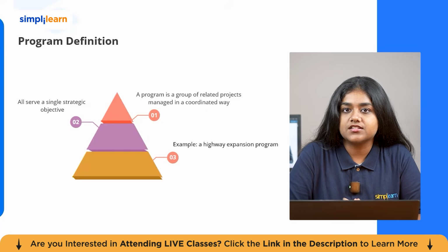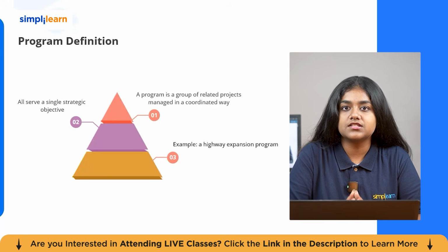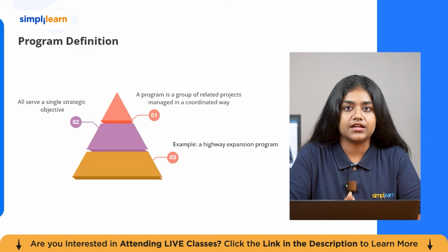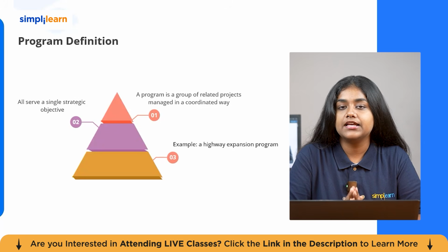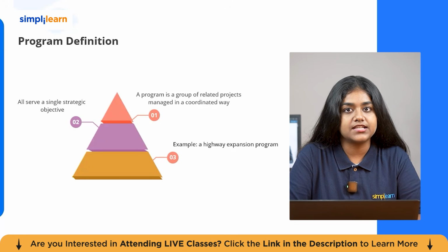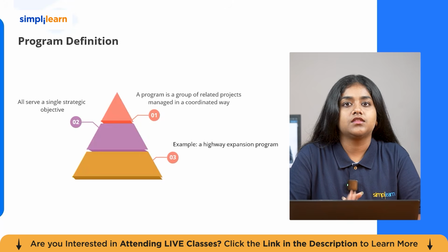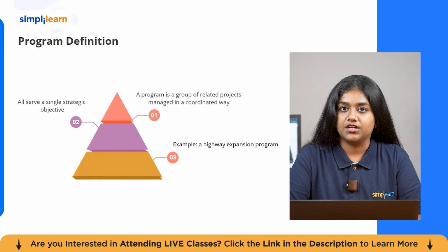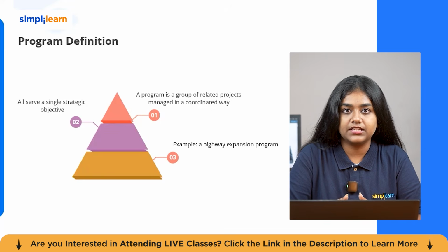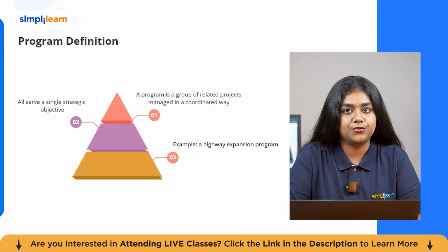So managing this as a program provides several advantages. First, resources such as engineers, contractors, machinery, materials, and funding can be shared or allocated more efficiently across projects. Second, reporting becomes more consistent because progress, cost, delays, and risks can be reviewed at the program level rather than only project by project. Third, risk can be managed in a coordinated way. For instance, if a delay in a bridge construction affects the road widening schedule, the program manager can adjust timelines and resources across the entire program.